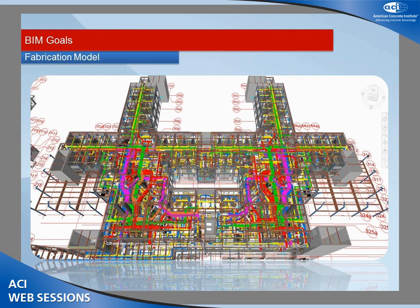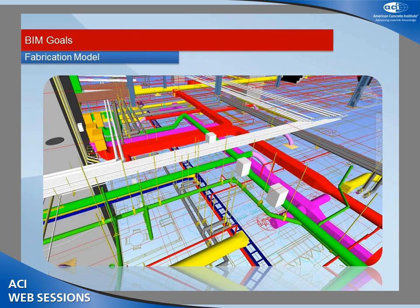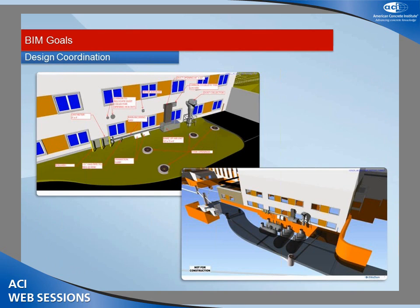There are the fabrication models. You can see the difference comparing design models against fabrication models — much more content. Sophisticated subcontractors using these modeling systems will go to a very high level of detail to control the geometry they intend to bring to the field — even going to the point of putting in pipe hangers. With a total station, you can actually program in the XYZ point of the intersection between a pipe hanger and the underside of the concrete slab, and then during formwork use a total station to lay out and pre-install all the anchors for the pipe hangers. The subcontractors have applications to do full engineering on these systems and calculate the number of hangers required based on pipe weight and stress analysis, so the geometry does change significantly from design to subcontractor submission.